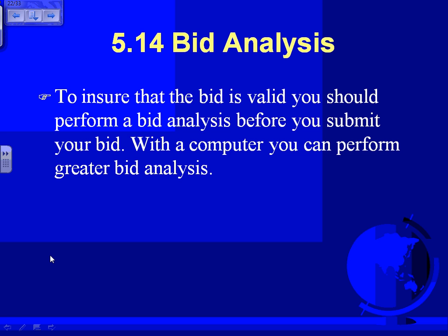So you have to depend on that, and there's also Means. You're right, there are industry standards like Means books. It will give you the average dollar per square foot for a commercial building, this amount. So you can gauge yourself against industry standards. Yes, Means, I'll show you guys the Means book. I have them in my office. I do them in commercial though. It gives you an average value.